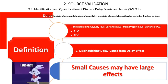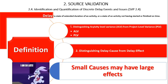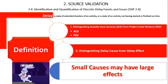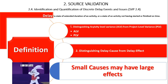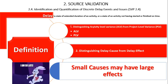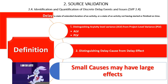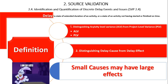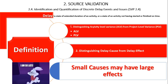What caused the initial activity-level variance for the chain of activities often does not appear on the schedule, but must be investigated and researched using project documents, data, and witness interviews. If a delay was appropriately inserted into the schedule as a new activity as a predecessor to the activity with the start delay, the cause of the activity-level variance is readily apparent. The identification of delay causes is a focus in the latter phases of delay analysis, during causation analysis.